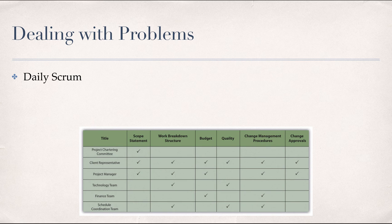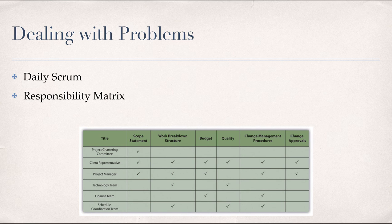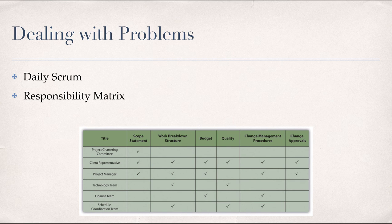In large, complex projects, there may be hundreds of project decisions made each day. To facilitate decision-making in complex projects in order to deal with unexpected problems affecting the project's scope, quality, or deliverables, a responsibility matrix is often part of the communication strategy. The responsibility matrix is included in the project management plan. This is essentially a table of people and categories of problems, specifying who has the authority to make decisions to bring the project back on track depending on the type of problem or issue. An example of a responsibility matrix is provided below.